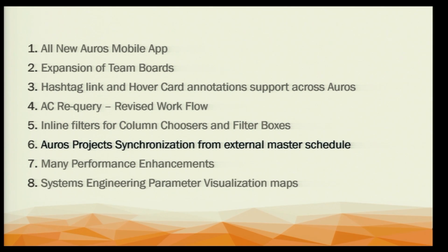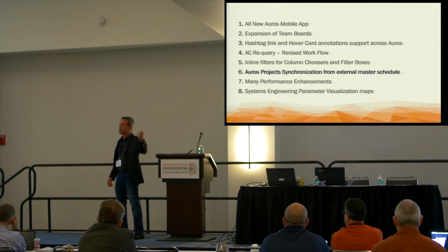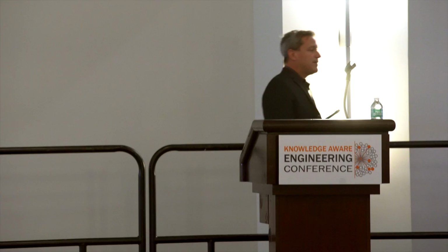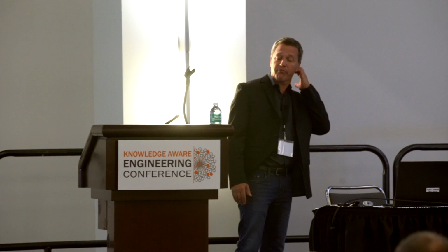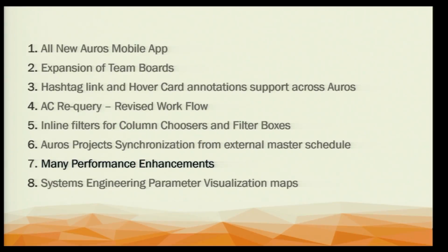So Wendy talked about project synchronization to a master schedule. It is a big deal. It will be very useful for the bigger companies. If you've got a tool that does master scheduling, that gives the teams the milestones, but the team is out writing their own task lists against those milestones, and you lose connectivity, oh, I didn't get that update for the milestone, you can solve that problem now. We can hook up to the master system, and everybody's dates get arrayed based on these checkpoints. It requires some integration work, but the way it gets done, I think, is going to be robust and very, very efficient. A lot of performance enhancements. Everybody wants those. And then I saved the best for last.